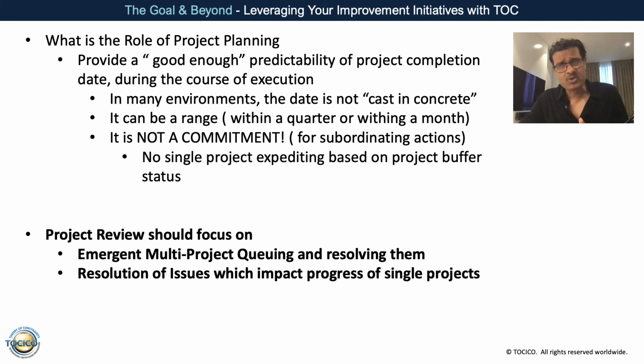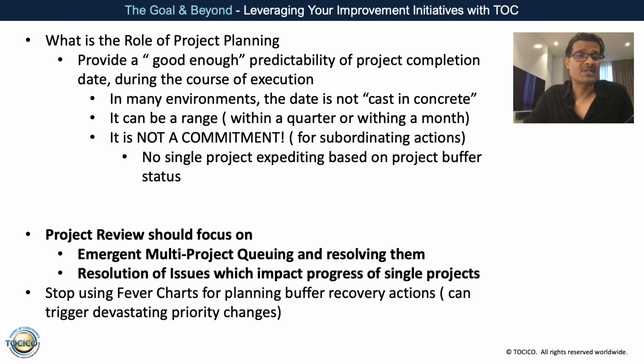So you have all the processes. You have the full kitting, you have your daily management, you have the gate meetings. You have very good issue resolution. So what you get as a date from the planning process is the latest estimate of how well you have done all these processes, and that's the only thing that you can do. You can cut out the wastages. You cannot cut out the touch time. You cannot cut out the value adding rework. You should not cut it out. So what you can only do is cut down the wastages.